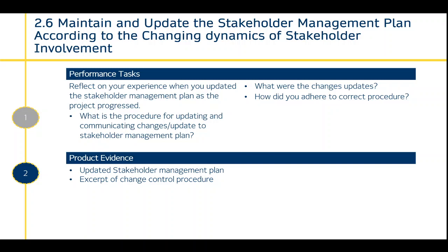So for example, a stakeholder might have been promoted within your organisation and they are more influential, therefore you have to change the communication methods that you're going to use with that stakeholder. Or a different organisation has been selected as a supplier, so that's a new stakeholder. Perhaps you're doing a construction project and you've overlooked maybe a community organisation that's made up of local residents. That would also have to be included. If local residents put together some sort of group, you'd have to then include them as a stakeholder, add that into the plan and manage your communication, manage how you're going to approach that.